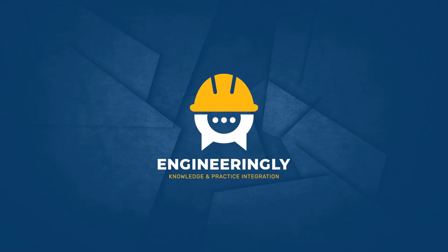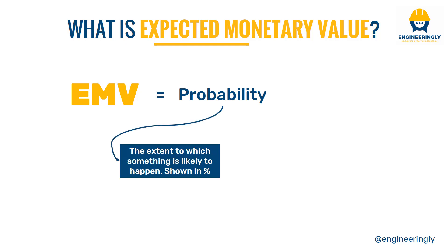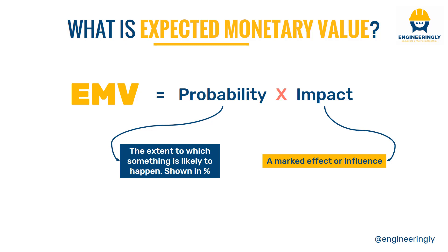In this video we are going to talk about Expected Monetary Value (EMV) and decision tree analysis in project management. EMV is the probability — the extent to which something is likely to happen, usually shown as a percentage — times the impact of the event. The impact is defined as a marked effect or influence, typically shown in currency. Multiplying the percentage by the impact gives you the expected monetary value of an uncertain future event. EMV is used in decision tree analysis.